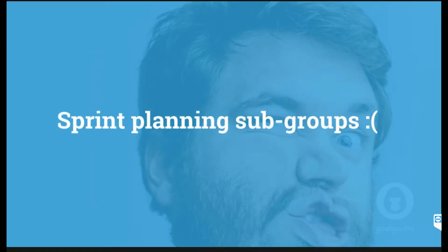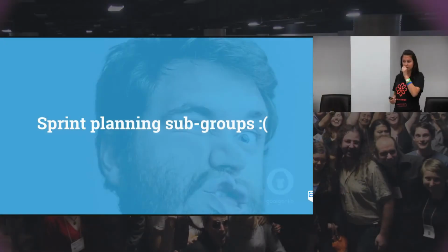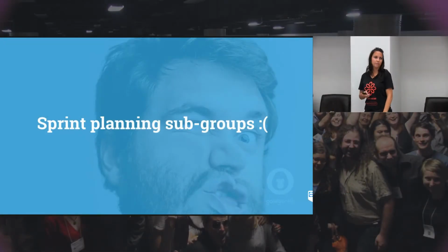And what we did was creating subgroups again. Sometimes we created them because this person has already worked on a feature, so it's more obvious that he would also work on it this sprint. Sometimes we split it because one time it was mainly focused on building features for the distro, and other features were mainly focused on client requests. So we made subgroups in the sprint planning again. We checked all the stories, and at the end of the sprint planning, we came back in one room and asked, okay, is everything clear? Any more questions? No, and then the sprint started.